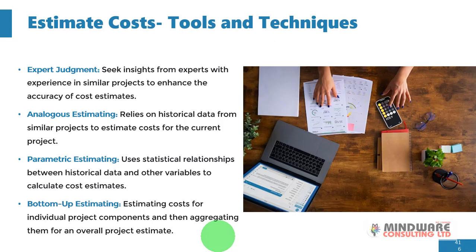All right, so you keep estimating from the least component or the least activity, and you keep going up like that. That is what we call bottom-up estimating. So at the end of the day, you now have a total estimate of the whole work that is to be done as far as the scope of that work is concerned. Okay.